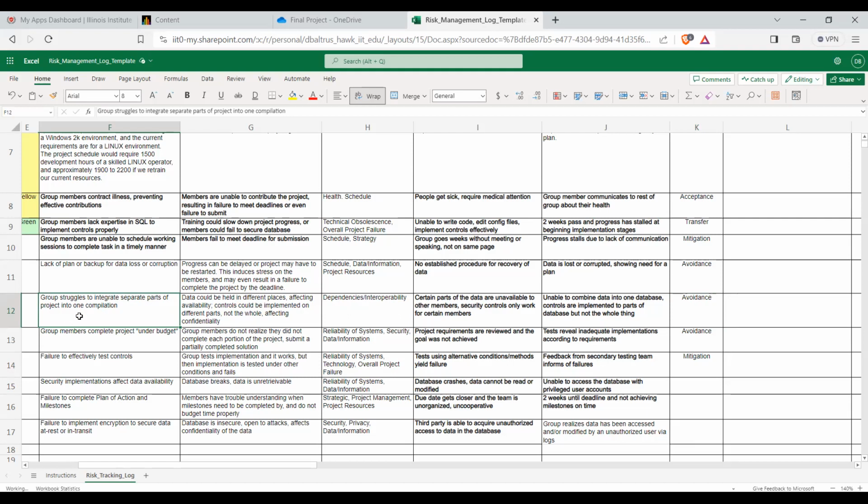If you're trying to avoid it, then it's not gonna be a risk. Right? Well, yeah, but I think we've identified the possible risks, and now we're gonna start at the beginning and say, instead of having everything in separate places, we're just gonna do it in one database, so that would be avoiding. I think mitigation would be, if we got to the point where it was in separate places and we realized it wasn't together, we change the format of one of them so that we can put them together. Right?